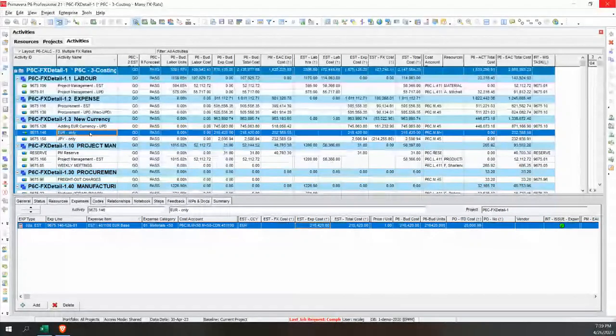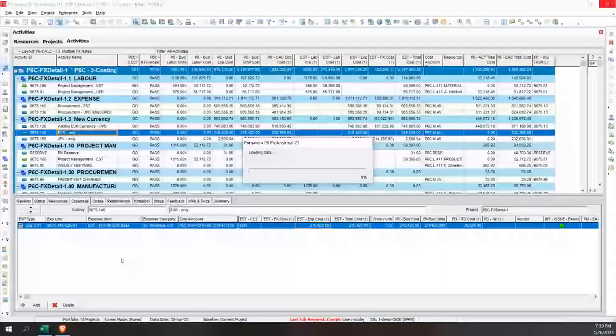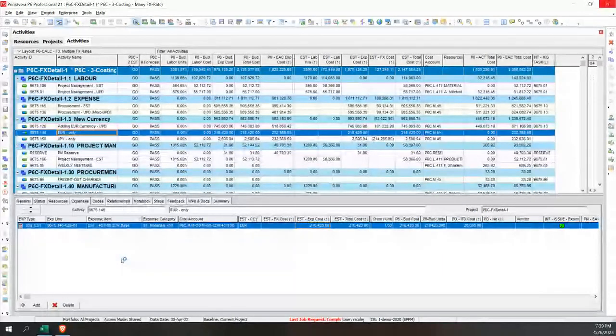We gave them the ability to put in the percentages that each one of those needed to be so that it would automatically create the lines. We have another client where we had a slightly different type of thing for resources. They had a crew in their estimate, but that crew didn't match resources. So they needed the crew to be split into multiple resources.